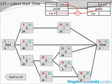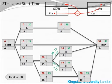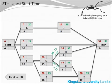The next one will again be tricky. For activity D, we can either calculate from the latest start time of H: 35 minus 15 equals 20, or from the latest start time of activity G: 36 minus 15 equals 21. In case of multiple outgoing paths, always take the minimum value. The minimum in this case is 20, and this is the latest start time for activity D.